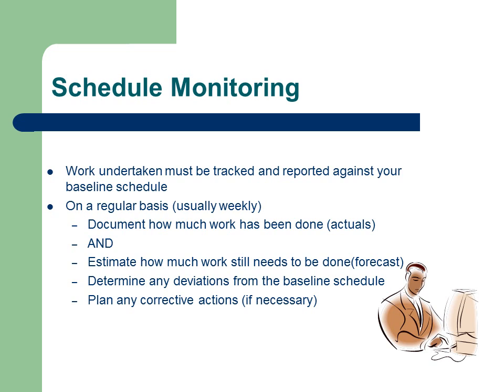Schedule monitoring. During the project, progress must be monitored against the original or baseline schedule. You need to document how much work has been done and, just as importantly, how much work still needs to be done. Forecasting is critical to understanding how well your project is progressing. If there are any deviations from your baseline schedule, you will need to document these and then recommend corrective actions.